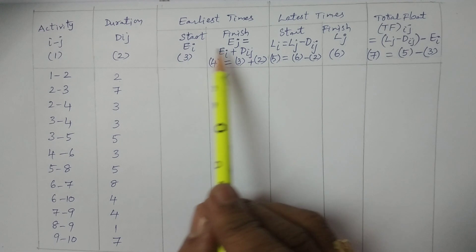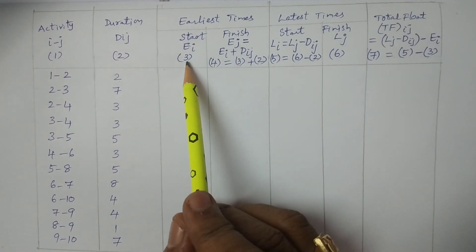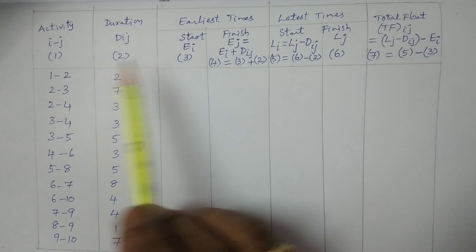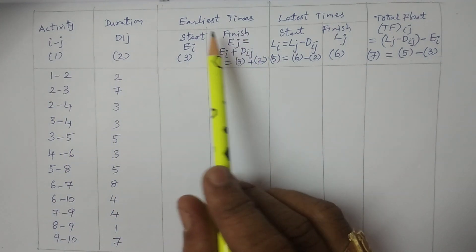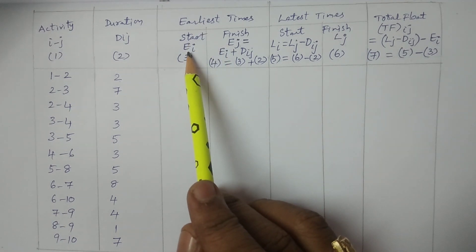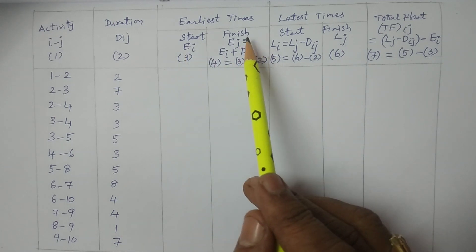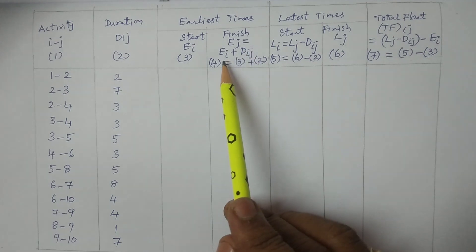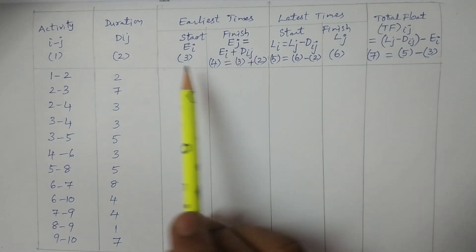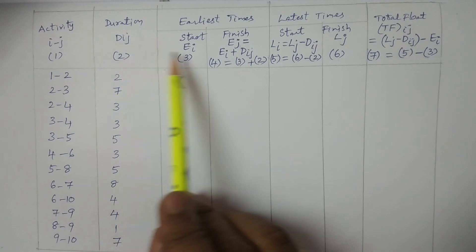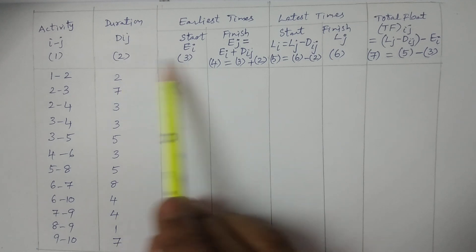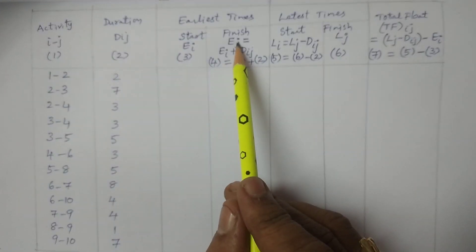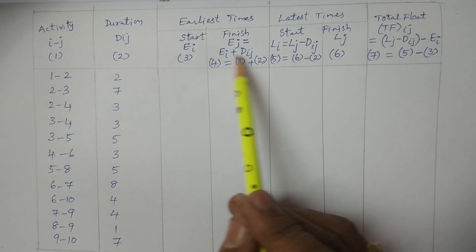I have formulated earliest times, latest times, and total float. Earliest times EI and EJ: EI is taken as the third column, also known as ES. Earliest finish EJ is equal to EI plus DIJ — a simple addition of the third and second columns. EJ is in the fourth column.